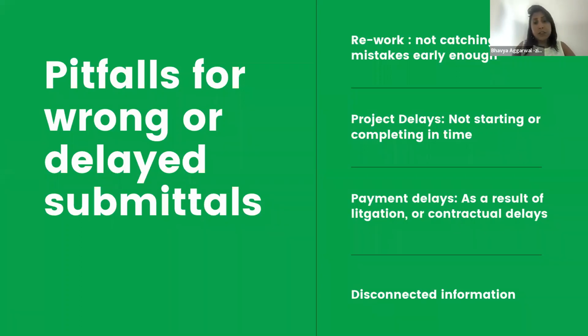But if that process doesn't go very well, what ends up happening is there's a lot of rework, and that could lead to costs and, of course, a lot of errors as well. Then project delays, because submittals go through so many stakeholders, it can delay the entire project.